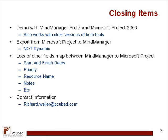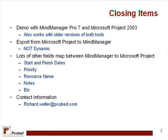Another piece of information you might find in value, that is there's lots of other fields that might map between MindManager and Microsoft Project. For instance, you can input start and finish dates into MindManager and have those transferred over into Microsoft Project. There's also the priority field that is mapped between the two tools. Resource name, notes, and there's probably additional fields mapped as well. I just don't know those off the top of my head and haven't stumbled into them.